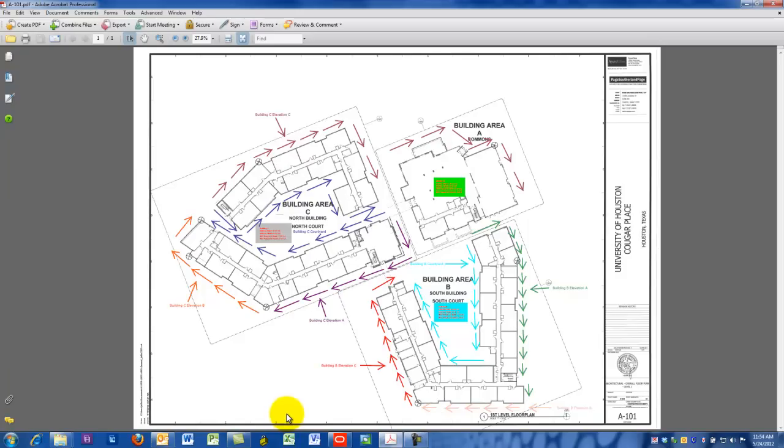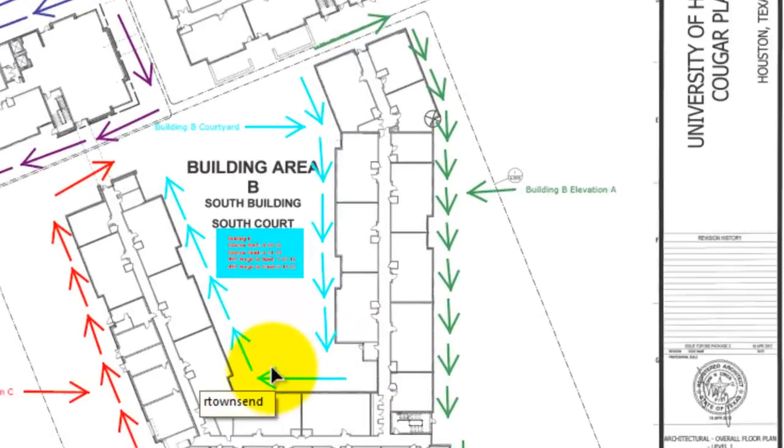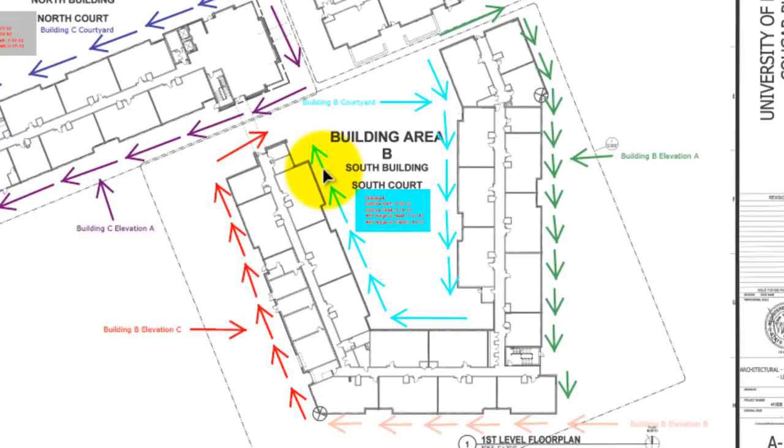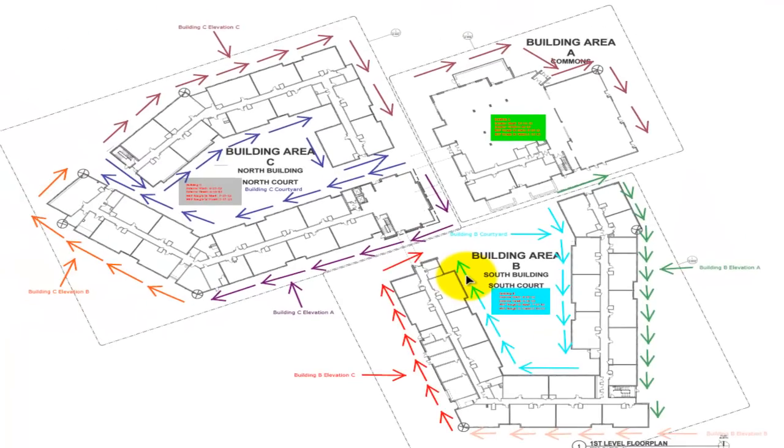The work breakdown structure is not automatically going to break it down into the separate buildings. And if you notice on this diagram, it identifies each building area, and it also shows which way the exterior skin is going to be placed on the buildings. And this is important because it determines how quickly you can get inside and do the work. So in this particular case, an activity code would be what building area is there, because the project team will begin to refer to building A, B, and C in their weekly meetings. So an activity code would be the building area for this particular project.